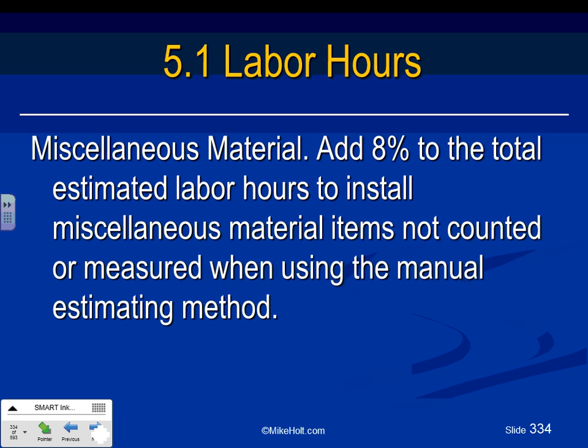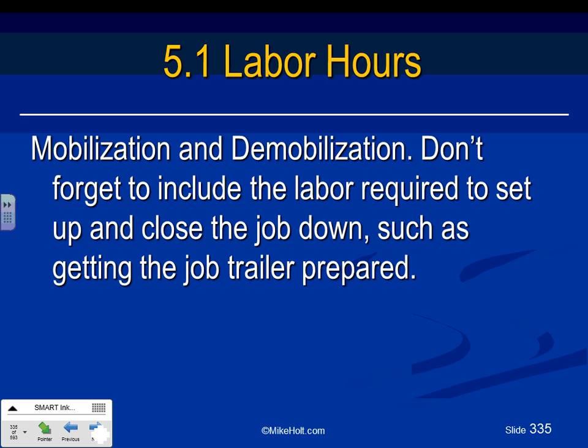Miscellaneous material, 80% of the total estimated hours to install miscellaneous materials, that's not accounted for. Mobilization, demobilization, putting your trailer and removing your trailer from the site.